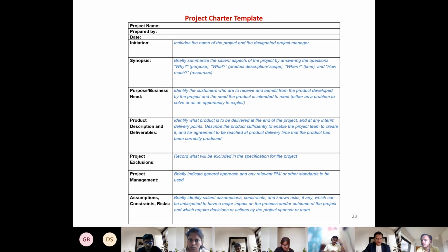Okay, you just can't jump from one to the other, because if the deliverables are not articulated, you will not be able to cost out whatever is not written there. You will miss calculating how much it will cost for that part of the deliverables. Okay. So the product description and the product deliverables are a very detailed description of the entire system that the project will deliver. So basically the blue slide where the scope and deliverables are, of Professor Gaurav. Clear? Okay. What is the next one?